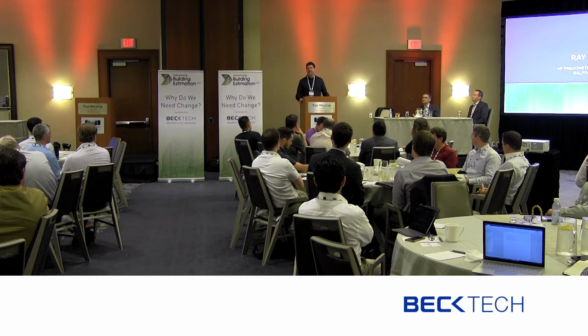And then you get into your deployment phase, which is how we are going to roll this out and how we are going to train. A couple things on the deployment phase. We're actually in that phase right now in our implementation. From a training perspective, we recognized that if you bring a couple guys from Beck and they do 2-3 days of training, 90% of the room is going to walk out and not be able to touch the estimating software for the next 2, 3, 4, 5 months, because they're currently working on another project and are not in a position to make a transition from one tool to another.